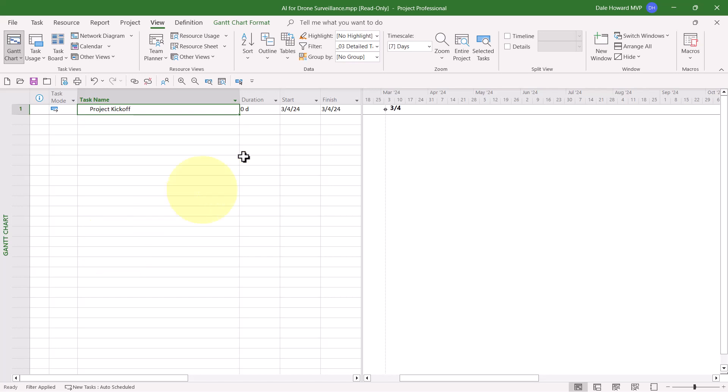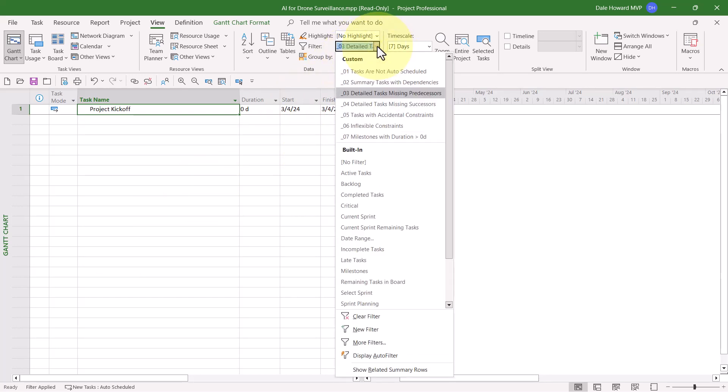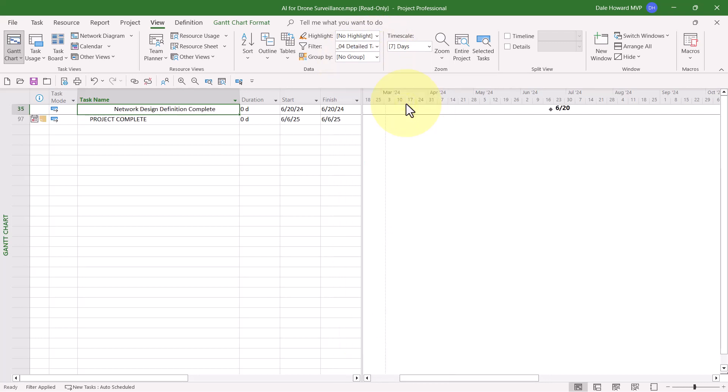I don't have that problem. So let's go look at the fourth filter, Detailed Tasks Missing Successors. When you apply this filter, there should always be one task that is returned, and that is the final task in your project because the last task can never have a successor. But notice I do have task number 35. It's a milestone task, and it's missing a successor.